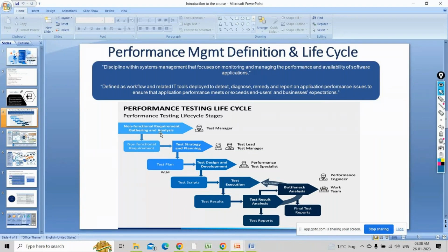So by this time, let's say you found that one script is taking 1 week. You can highlight that to the client and get that extra timeline added in your test plan, saying that the script development is a little bit tricky, so it's taking a week for me to develop the script. Accordingly, you can add those extra timelines in your project.